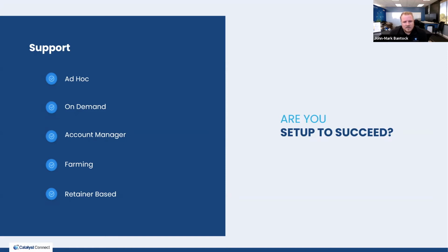And what we found is that in the early days, we could very easily do this with a very small team and a small client base, having the same team do the implementation and support. And as we grew, we very quickly realized that we needed to carve off a separate department to service those support tickets, be responsive, and not be distracted from the stricter timelines of an implementation project. And you have to be able to balance resources between having those deliverables and timelines for implementation, while also having the capacity to respond to more urgent needs that come up with existing clients.